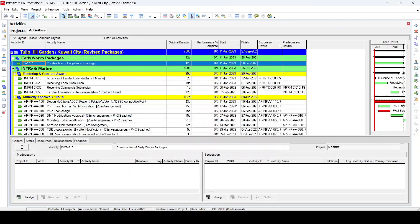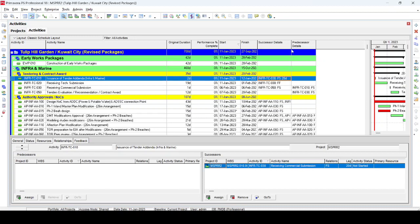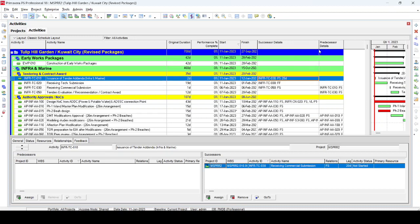From the list we add Successor Details and Predecessor Details. The Successor Detail column is the most important. Here you can see '20d', meaning this activity is linked finish-to-start with a 20-day duration — this activity has lag. You then have to go through all activities one by one.